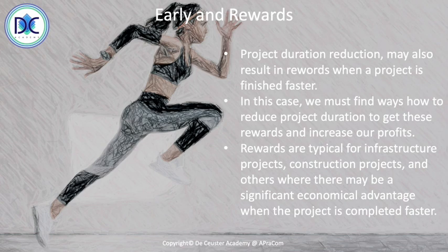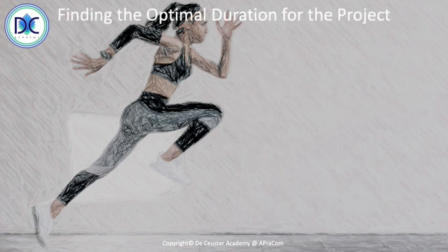For example, when we look at hotels, I don't think it would always be good to get a reward in case the project is finished earlier. It depends on when the hotel will be open, and it makes no sense to motivate a company to finish the hotel faster when you don't have any clients going to the hotel. So you have to look at the economical aspects too.